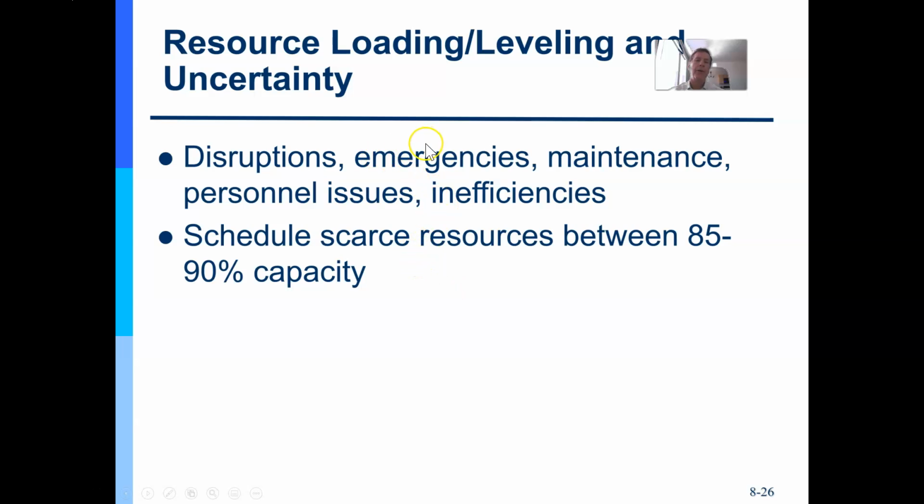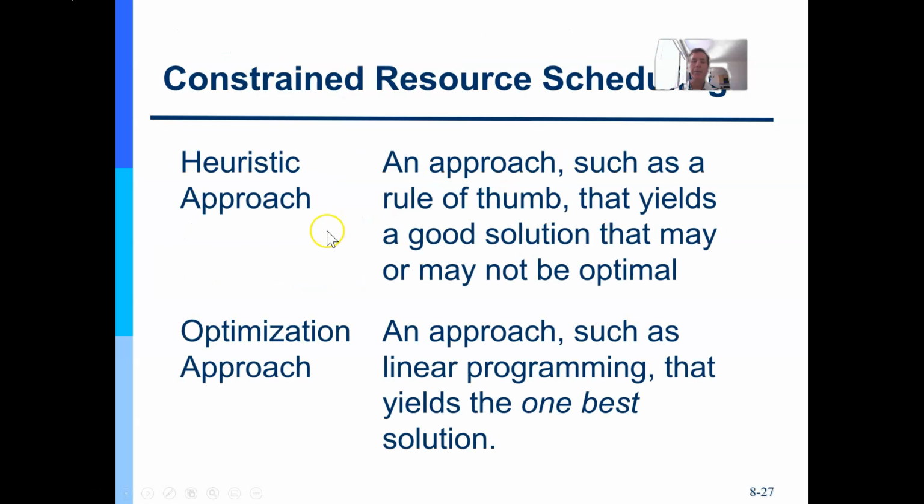And so with resource loading or leveling, I should expect disruptions, emergencies, maybe some maintenance issues that have to go on. People pulled off my project for other reasons, right? And so, especially if they're a scarce resource, do not schedule them to 100%. Put it in your justification. Put it in your resource management plan, which describes how you're going to manage resources, so leadership is aware. But you want to make sure that you manage them appropriately.